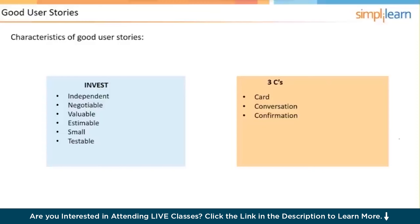The Three C's of a user story: the first C is Card - user stories should be able to be written on a 4x6 inch index card or similar media. The second C is Conversation - the user story card is the item used for the team and product owner to talk and discuss, ensuring they are on the same page about what is actually supposed to be developed. The third C is Confirmation - each user story must have acceptance tests, which are used during the sprint review to confirm it is acceptable.